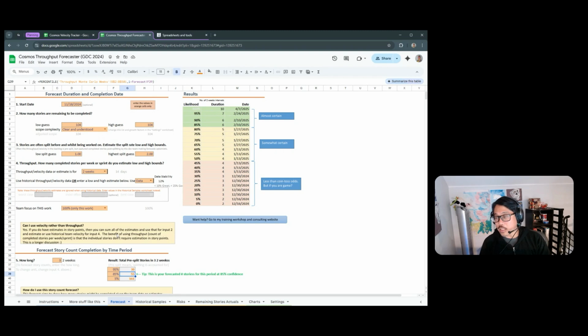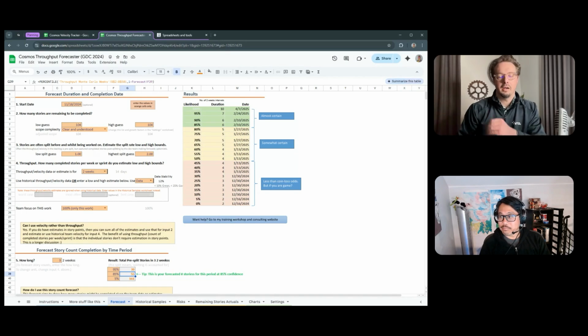And so using that forecasting data, if you have a specific amount of work you have to get done, you can say when it is going to land, which can then get you into your scope conversations about this is not going to fit, so what are we going to do instead. And the other direction might be we have 6 weeks and we want to pick the amount of work. The amount of work that will fit is that amount. So let's look through and prioritize our backlog and pick the most important work until we fill up the bucket that the spreadsheet says.